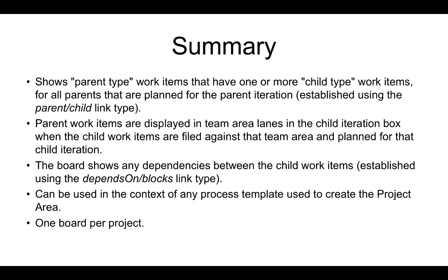To summarize: the program board shows parent type work items that have one or more child type work items, for all parents planned for the parent iteration, established using the parent-child link type. Parent work items are displayed in team area lanes in the child iteration box when child work items are filed against that team area and planned for that child iteration. The board shows any dependencies between child work items established using the depends-on/blocks link type. It can be used in the context of any process template. Currently the limitation is you can have only one program board per project.